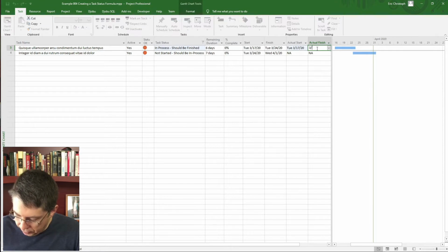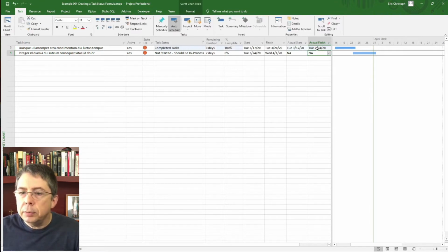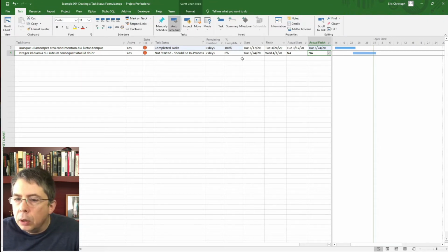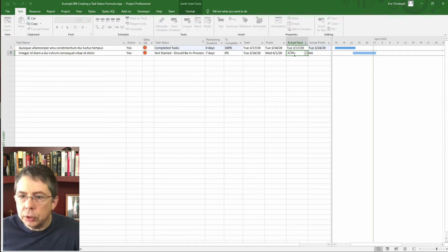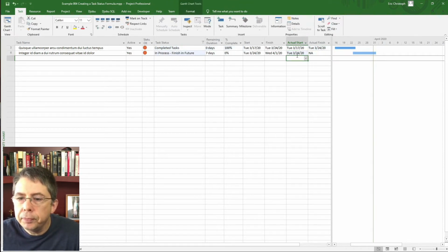And all we have to do in that case is update the actual start and the actual finish. That'll update our % complete and our remaining duration. For task 4, well, we talked to our tech lead and he said, yeah, it started March 24th. So we put an actual start in of March 24th.